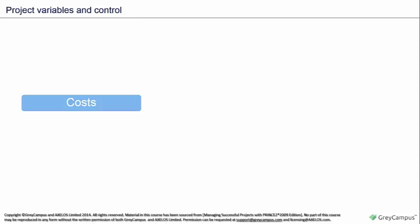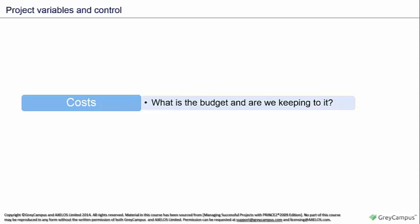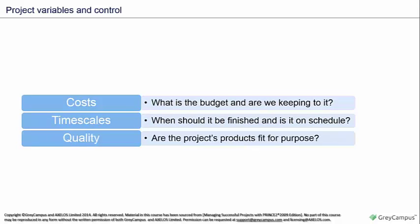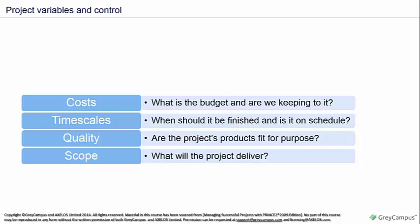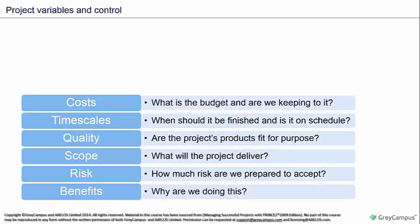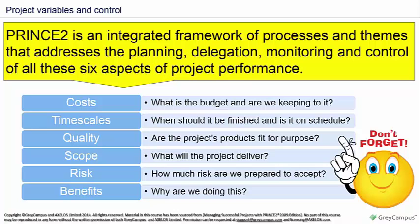What will the project manager be controlling? They'll be controlling what we call the project variables: Costs - what is the budget for this project and are we keeping to it? Timescales - when should it be finished and is it on schedule? Quality - are the project's products fit for purpose? Scope - what will the project deliver, and are we making all the things we're supposed to be making? Risk - how much risk are we prepared to accept in the project? And Benefits - why are we doing this, why is this project taking place? This list of six items is one you need to remember, as these are the main project variables that we need to control.